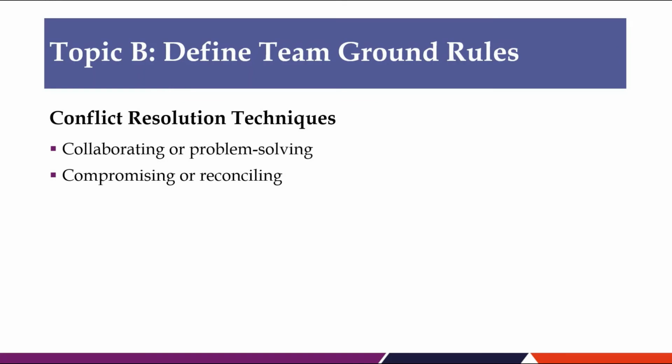Withdrawal or avoidance. With this technique, the parties retreat or postpone a decision on a problem. Dealing with the problem is a PMI-ism. Therefore, withdrawal is not usually the best choice for resolving conflict, though there may be situations where it is necessary.